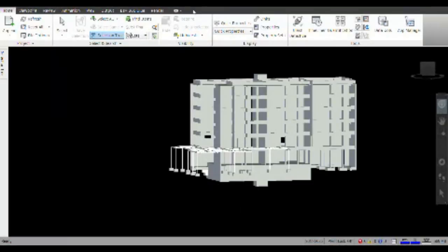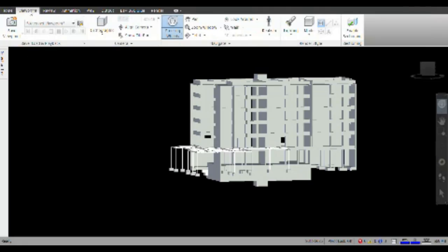With Timeliner, a tool used to gradually plan the actions of a project, we begin by setting the start date and then establish an end date within a speculative framework, as unforeseen events may arise during construction. The categories used for the simulation correspond to the rough construction phase, covering from the basement to the sixth floor. How can we see on this stage?